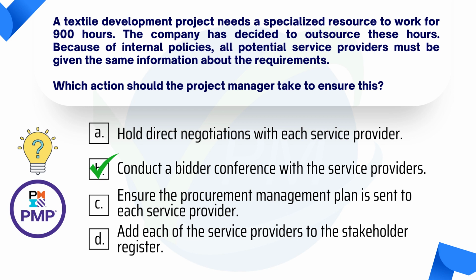Okay, and the key component here for the bidder conference is to make sure and maintain that there is no preferential treatment. Okay, so just based on the value of the proposals that are submitted. Therefore you share information with everyone; all information is shared with all bidders.